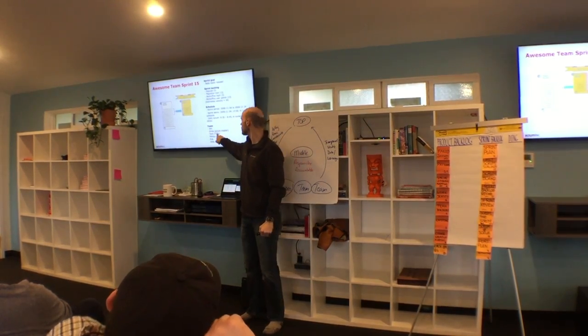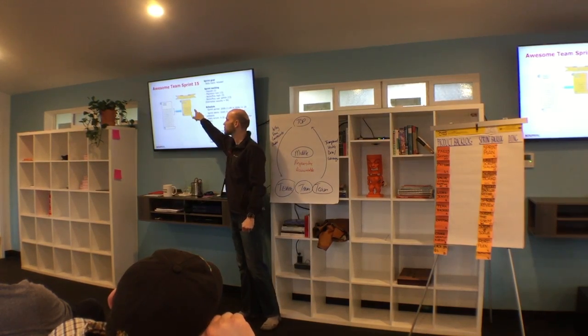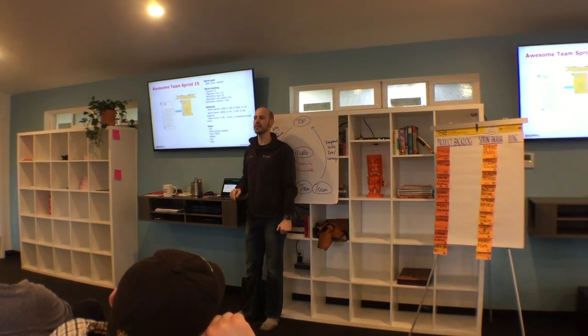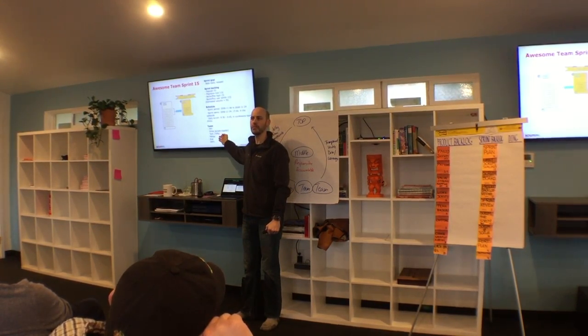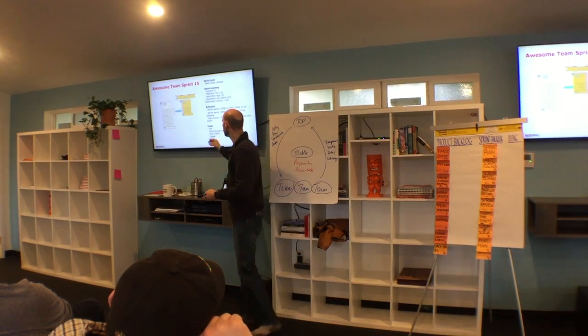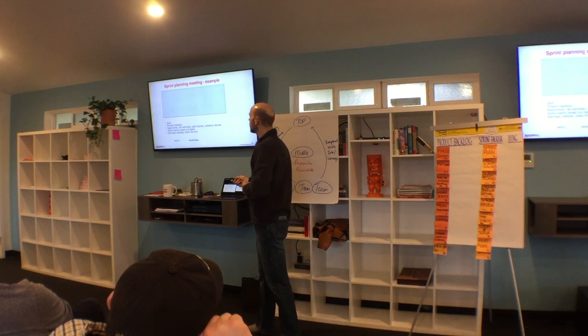So they make it visible on a big poster on the team wall, and they show this anytime they show the sprint burn down. So if someone says, I need this sooner, they say, can you fix Tom's allocation? That way the conversation isn't about work harder, it's about what is the impediment. So they make it visible. The whole team knows who they are and where they're meeting. Here's what it looks like in detail.